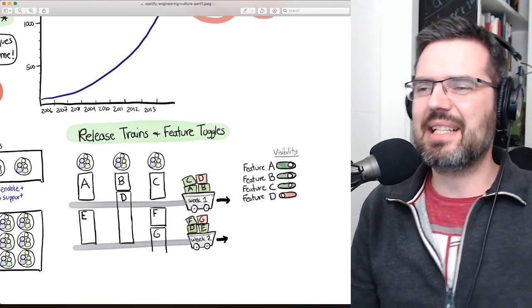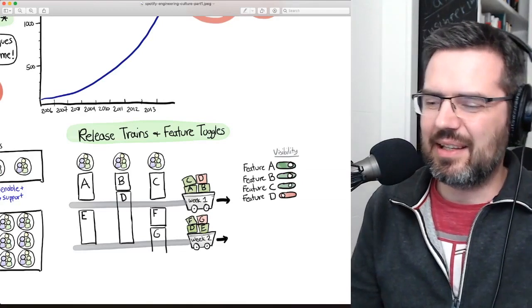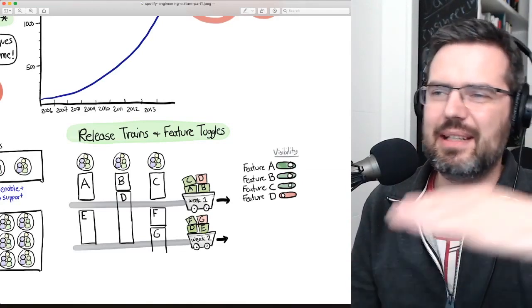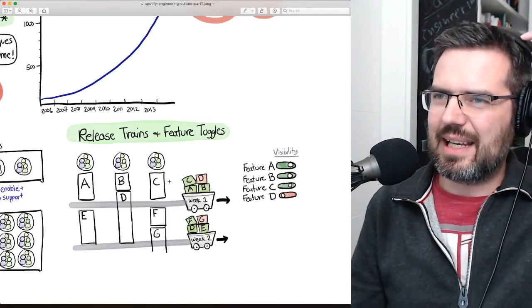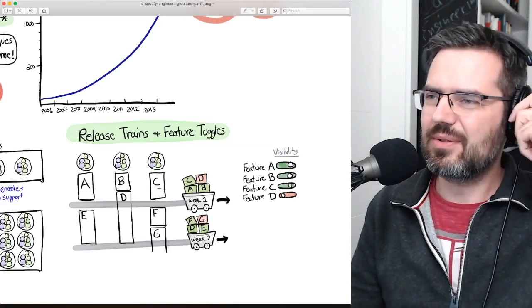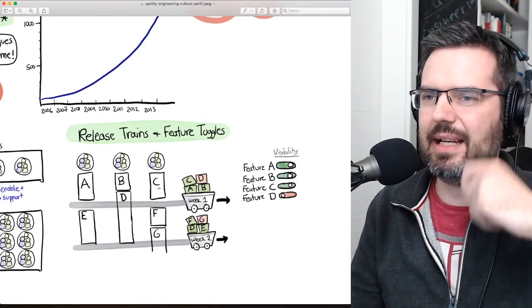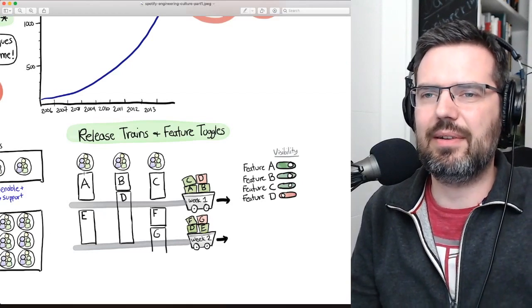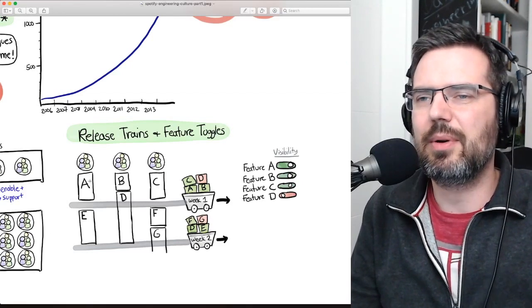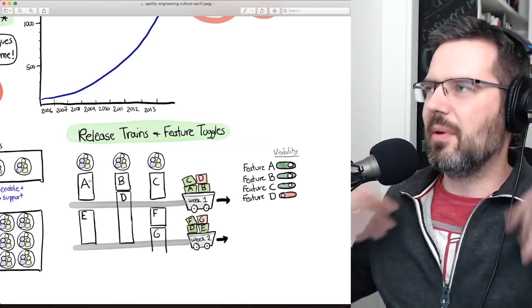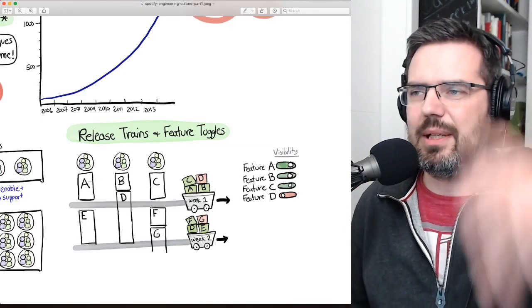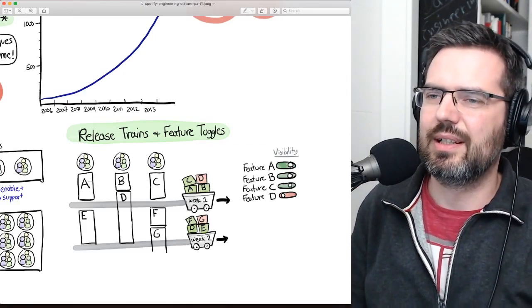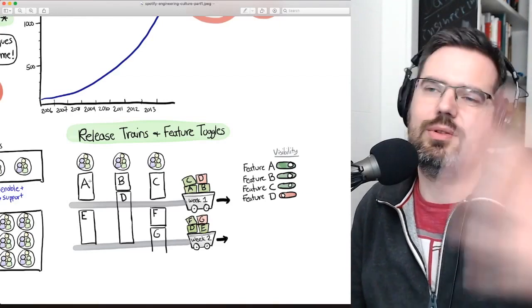So the thing is that they're releasing every week. You have a release train, and this train comes every week, and if you have a feature that needs to be deployed, you can just deploy this every week and make sure that this gets to a routine.